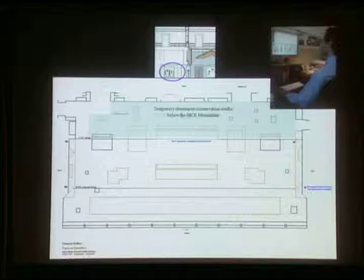After much discussion among AAOA staff, our construction staff, the architects, and engineers, it was determined that the art would be stored within the Pacific galleries, in the long and proportionally narrow space below the mezzanine, and just beyond the area where I showed you before, so this is the elevation, and here's the plan view. Just beyond the area where the truss was to be installed. From the beginning, everyone realized that this former gallery would have to be made secure, supplied with electricity, ventilation, and computer lines, and sealed against dusts and pests. The engineer assured us that construction noise and vibrations would be minimal.